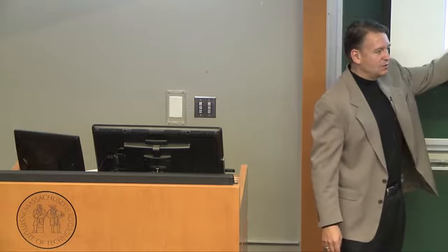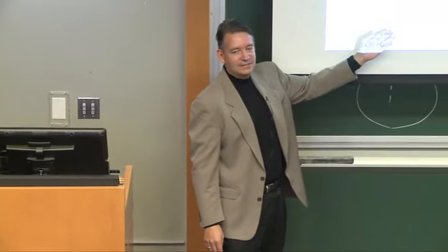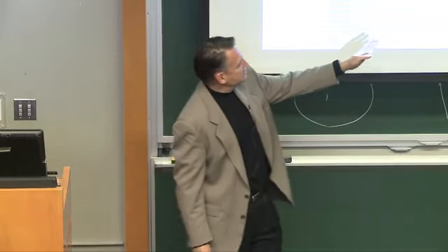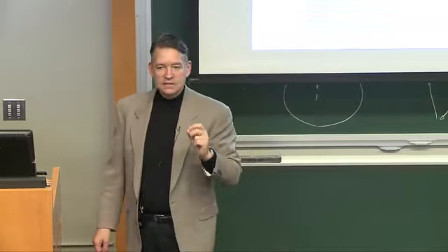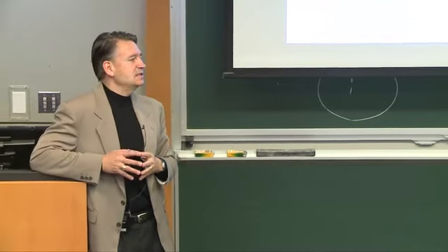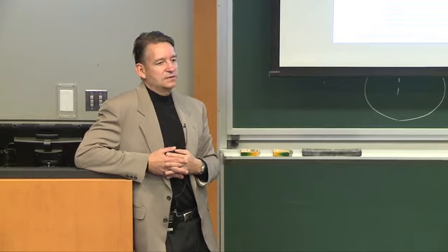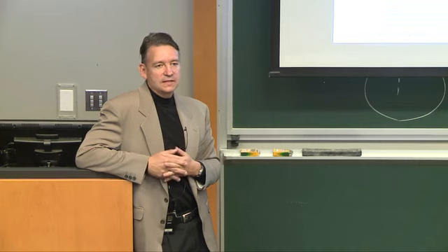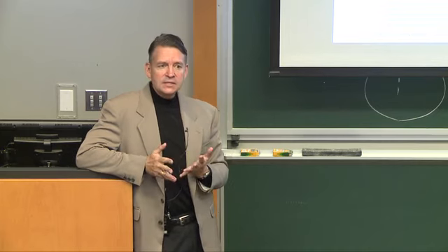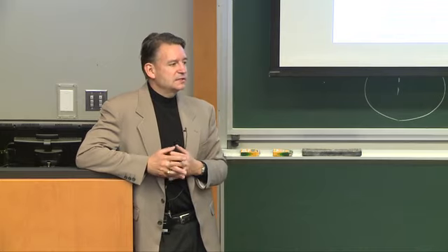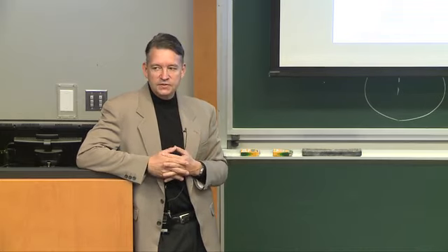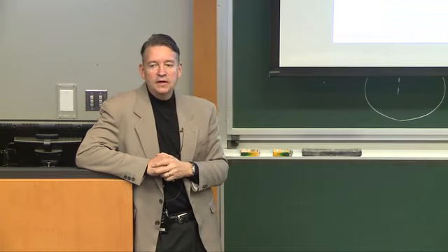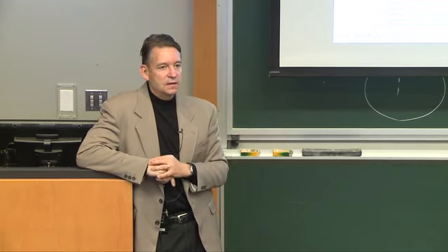And at the CDR, you're going to go through all this. So you can imagine what that means. And then success criteria on the right is, in order to successfully pass the CDR, these are all the things that you have to basically have. You have to have approval for all these things. Now, in reality, just like at the PDR, at a CDR, things will come up that you missed or that people have concerns about. And so you will make a list of those, and then you have to address these action items coming out of a CDR.